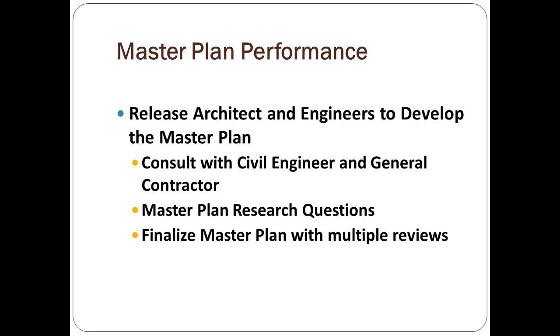Here's what happens if you don't. You can go through a complete master plan, leave out a key component of inquiring and asking them to look at it, get the master plan done, present it on Sunday, unveil it to the congregation, and a couple people walk up to you who you have not included in the process of the preliminary plans that are a part of the master plan process with the designers, and they look and go, oh, what about that? We can't use that for our teen ministry. Didn't you realize that we did such and such?